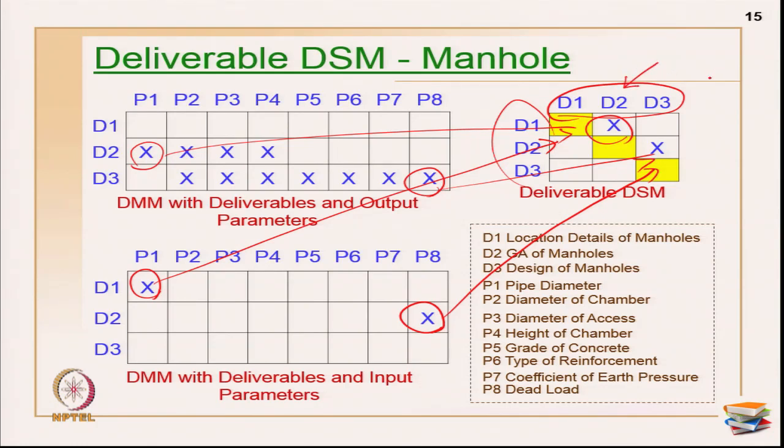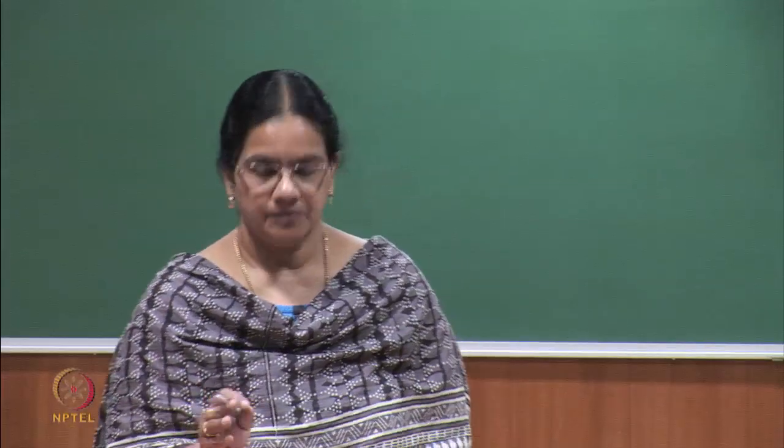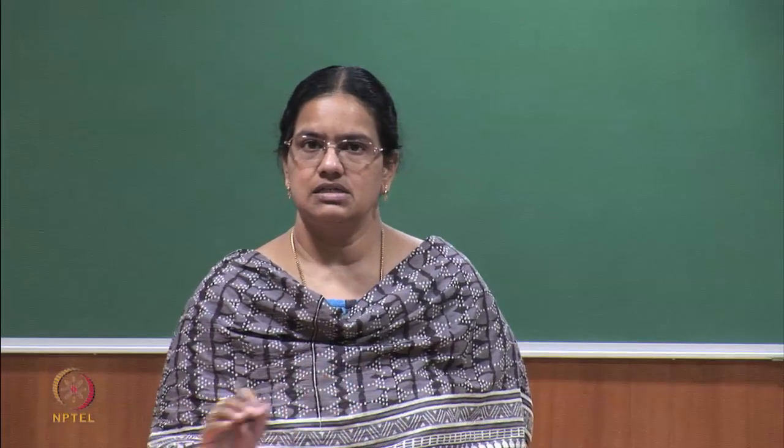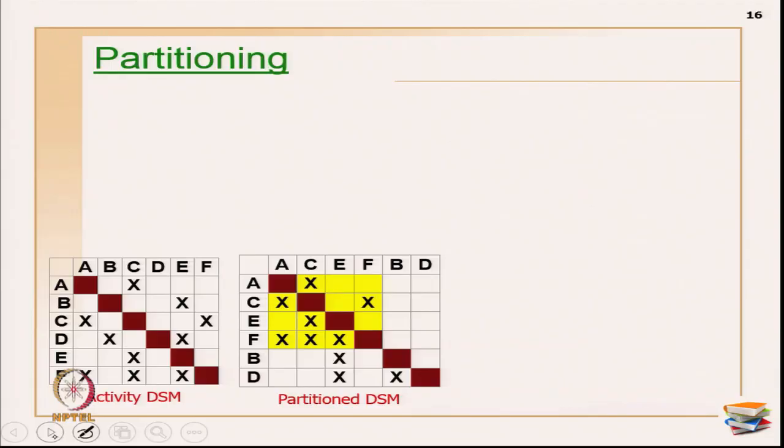Once this is identified, for identifying X marks you can multiply the variable matrices and you will still get the relationships identified. Then go through it with the experts, see whether everything has been identified, and validate your matrix formation. Because if you identify a wrong matrix, then obviously your results are going to fail very badly. So you have to take care. That is all about matrix formation.